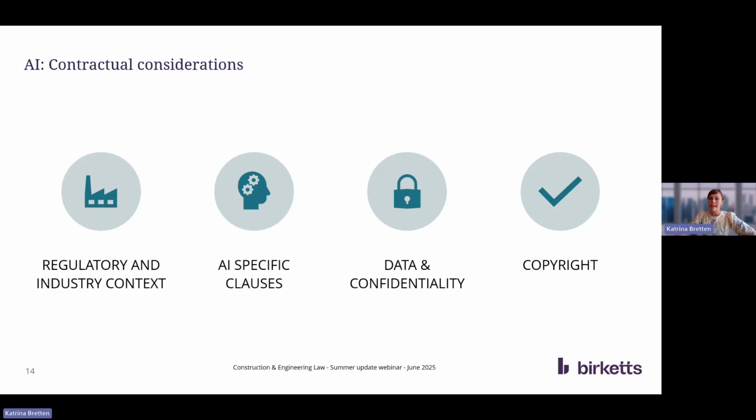In particular, a procurement policy note from March 2024 urges public sector bodies to disclose when AI has been used in the tendering process and encourages those public sector bodies to carry out additional due diligence if bidders have relied on AI tools. It's therefore likely to be a question that you'll need to answer when it comes to tendering.